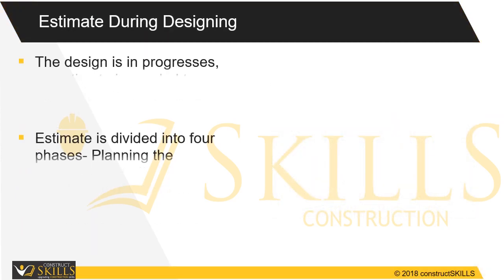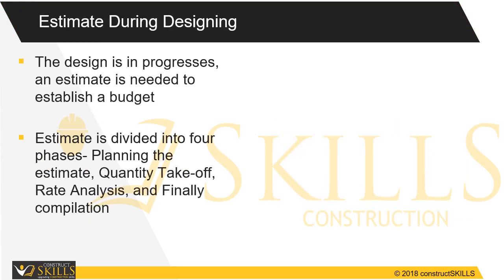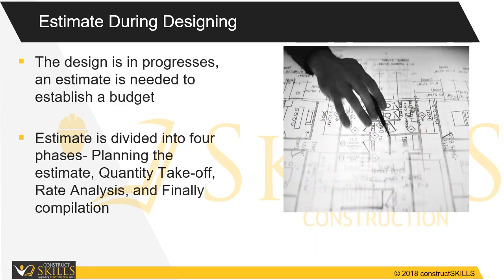Estimate during designing. Once the design is in progress, an estimate is needed to establish a budget for the project. Preparing an estimate is divided into four phases: planning the estimate, quantity takeoff, rate analysis, and finally compilation of the estimate.